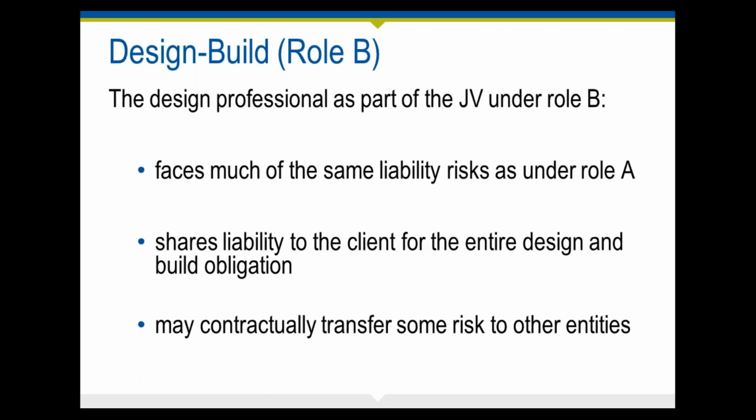And you should also, of course, require that the contractor obtain appropriate general liability coverage, including contractual liability coverage. And you should always engage your insurance advisors before engaging in these activities. The contractor and subcontractor should also be required to purchase performance and payment bonds that will, in effect, ensure the performance and payment obligations of the contractor.